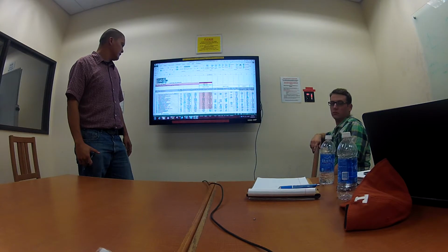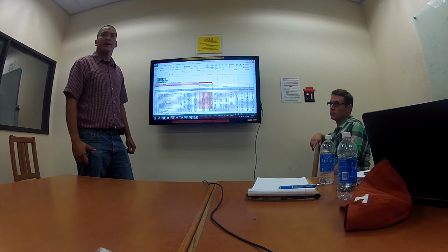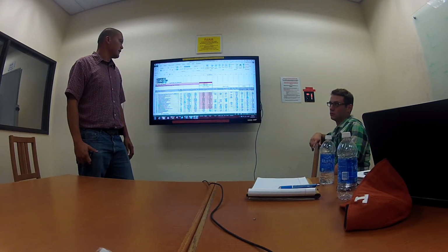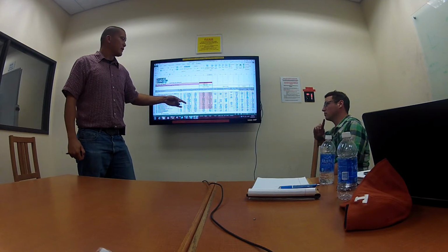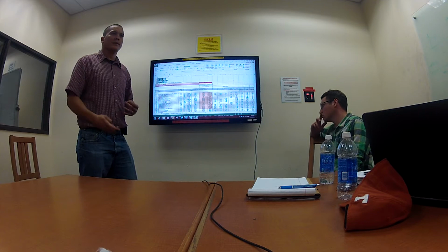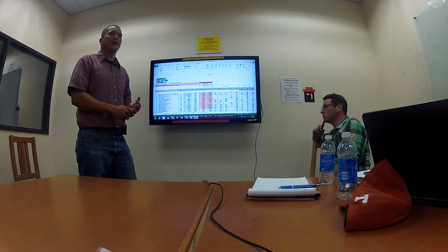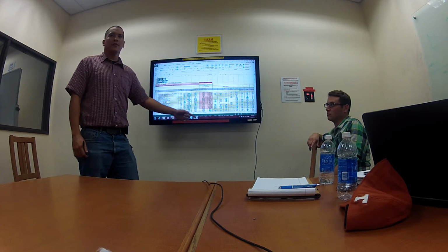They're not going to go through and ask why this item has an additional $10,000 associated with it. They'll probably definitely ask that question, and your answer is either one, we underbid it because we think it's going to underrun because our takeoff was yada yada, or we weighted it this way because of this, or two, we had that item closed out at the end and we received a cut late in it, and we took that cut in another item.